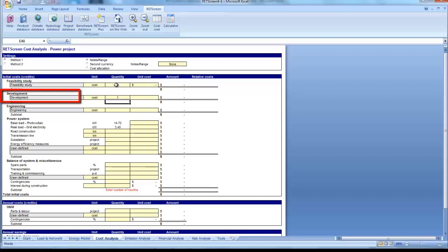Similar to requirements for feasibility analysis, development activities are much more pertinent with larger projects that require a number of non-construction related managerial activities. For a smaller project, such as the one considered here, the development cost may be reduced to the building permit. As an example, Los Angeles County lowered their residential fees in the summer of 2009 from $1,144 to a fixed fee of $370.